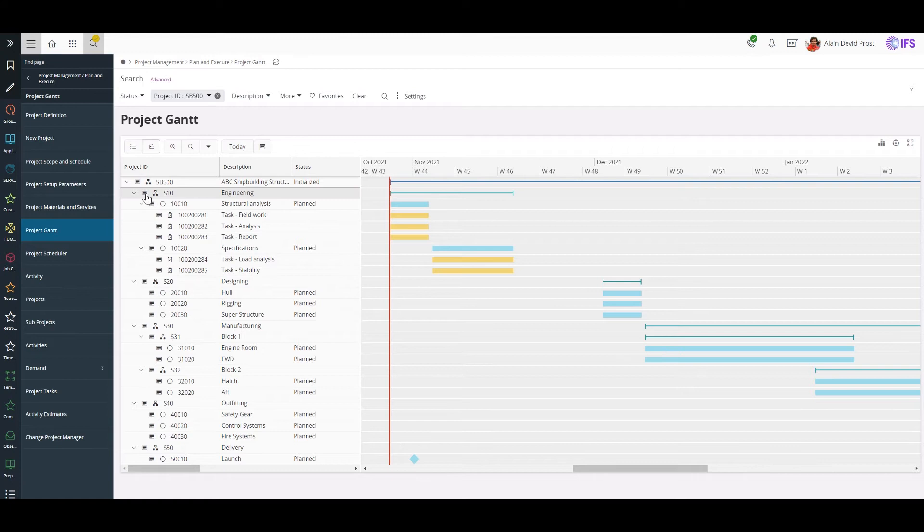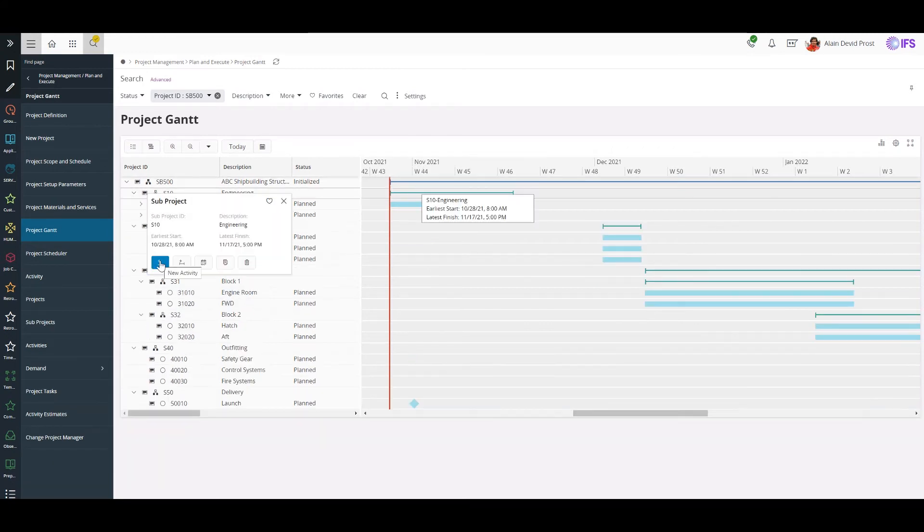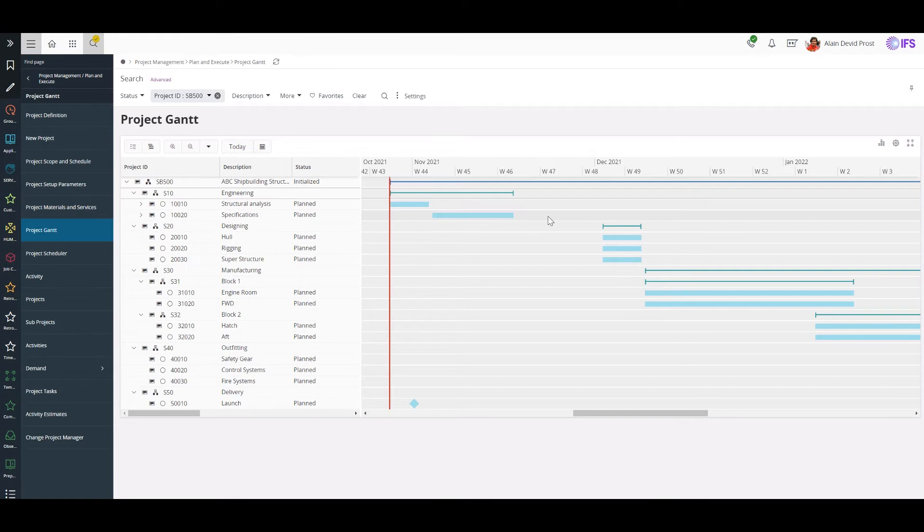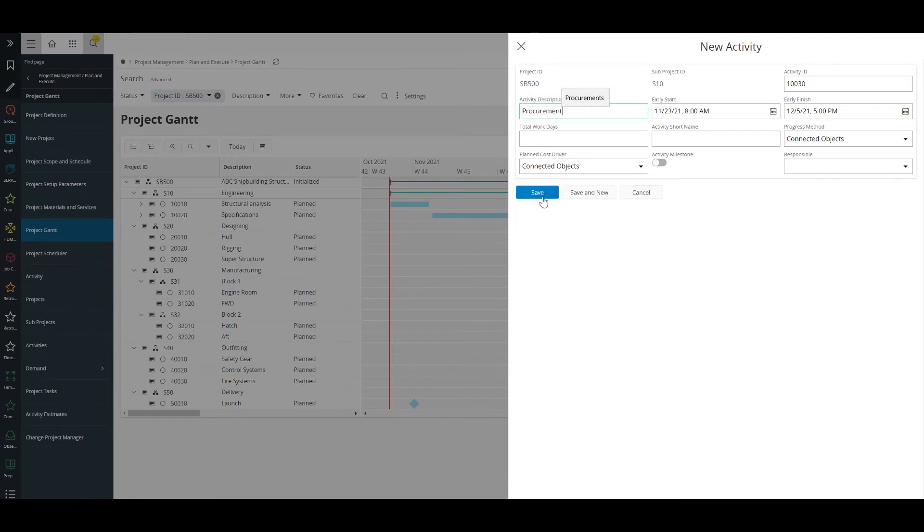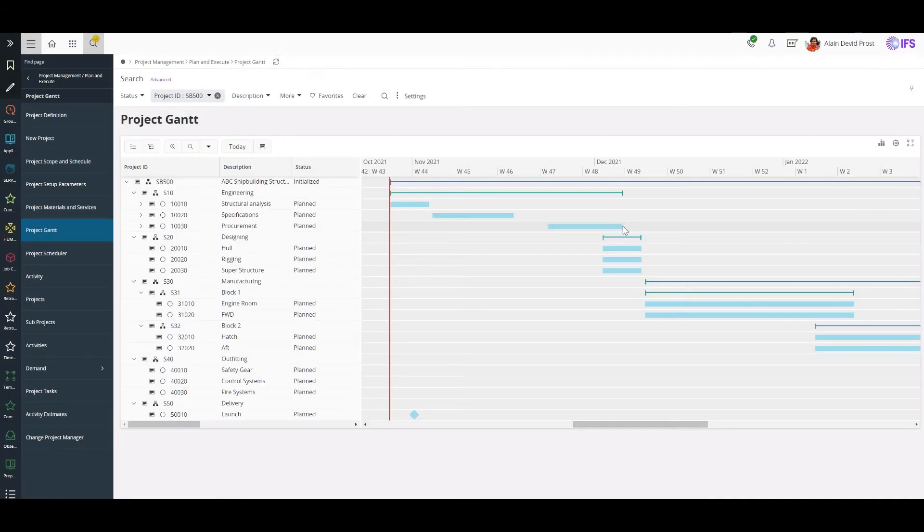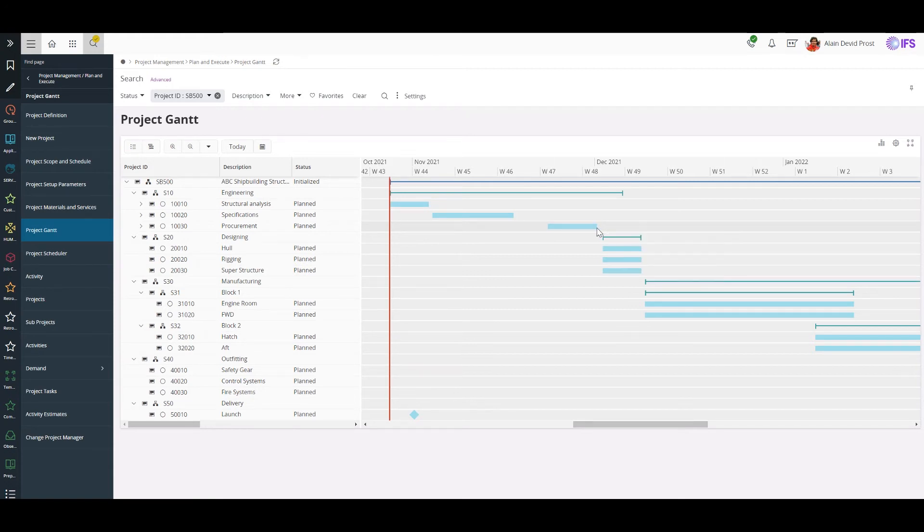Now I need to add a new activity to my project. So I can use add new activity option or I can draw a square like this to create a new activity. I'll create a new activity for procurement now. If I need to adjust the duration of the activity, I can do it just by dragging the activity like this.